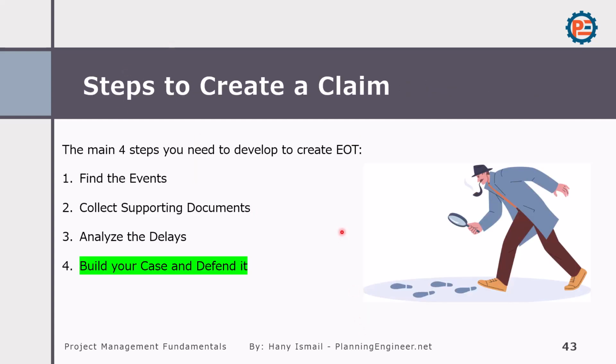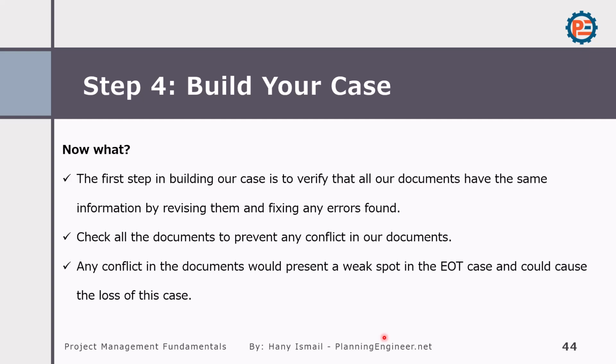After you created the delay analysis and you are ready now, you need to build your case and defend it. What I mean by build your case? It means that you need to be very clear and very organized. You need to have and verify all the documents you have. Check the documents to prevent any conflict in your documents. You should not have one document say right and another document say left. Any conflict in the documents would present a weak spot in the EOT.